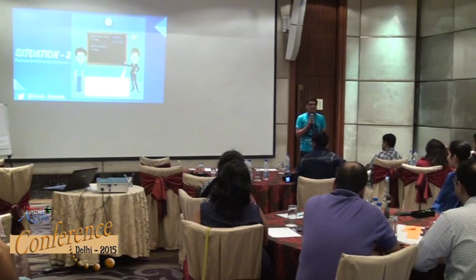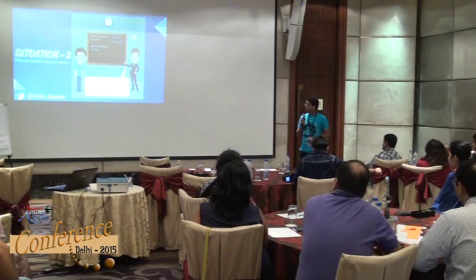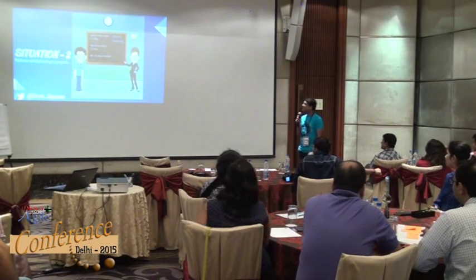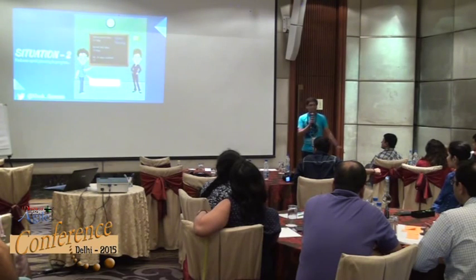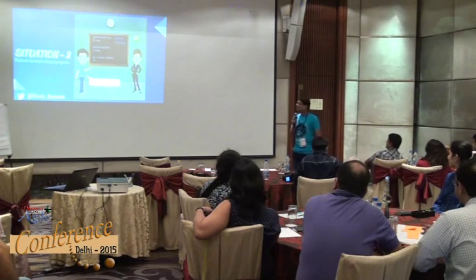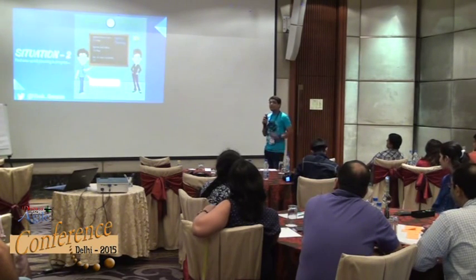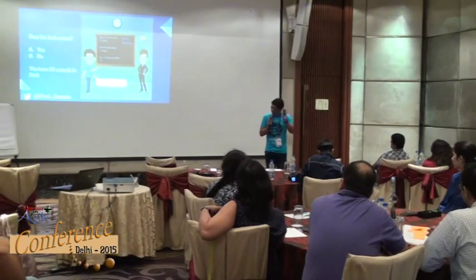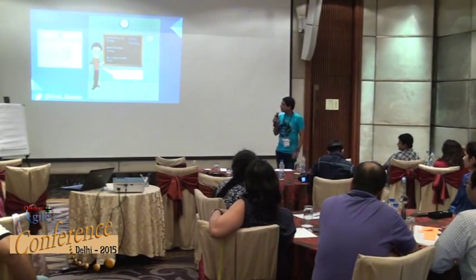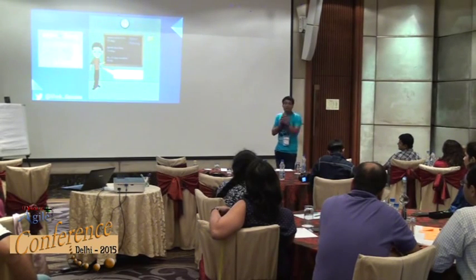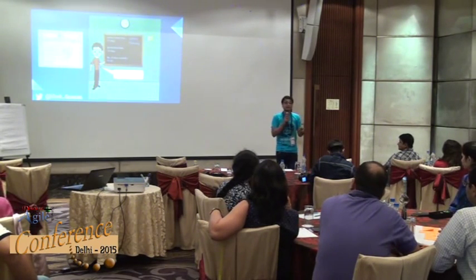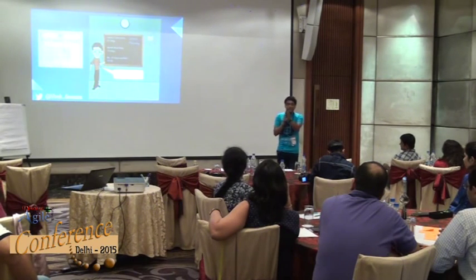Okay. Excellent. And you see that and say, okay, good, but can you fill this out? Number of days available for work? Then one team member, very fast, writes 15, pretty straightforward. May 1 to May 15 days. Now you have a very small question. This is not the entire question for this response, but think about it: does this look correct? No. Proceed. And then you go and say, boss, this is the workday calendar. We have 5 days every week, and 1 day is a holiday. Now the number 15 came down to 9 in your calculation, and you are saying, no weekend work. Right? Now, there is a number 15 and there is a number 9.